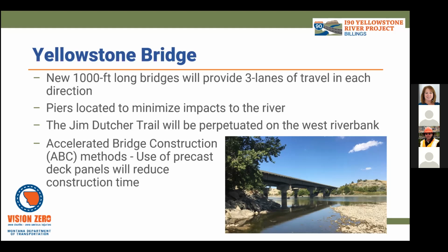And so compared to traditional methods of building a bridge deck, using these precast deck panels will prevent us from having to form the deck, place reinforcing steel, place concrete, and then allow that concrete to cure. So the precast deck panels will significantly reduce construction duration and reduce the risk of that work extending into the winter shutdown season.